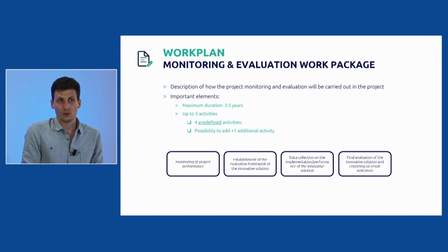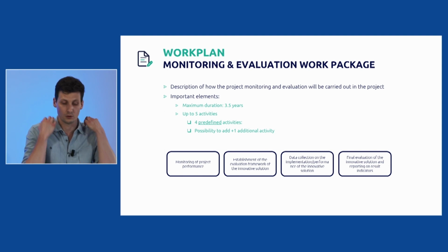Pay attention to this work package. It is open during the entire duration of the implementation phase, but do not start the data collection at the very end. You need really in this work package to be able to show how all along the implementation phase you are going to monitor the data, to collect the data, and how it is going actually to come back in a way to the implementation, how you can adapt from the data that you are collecting and the lessons that you are learning from your project.